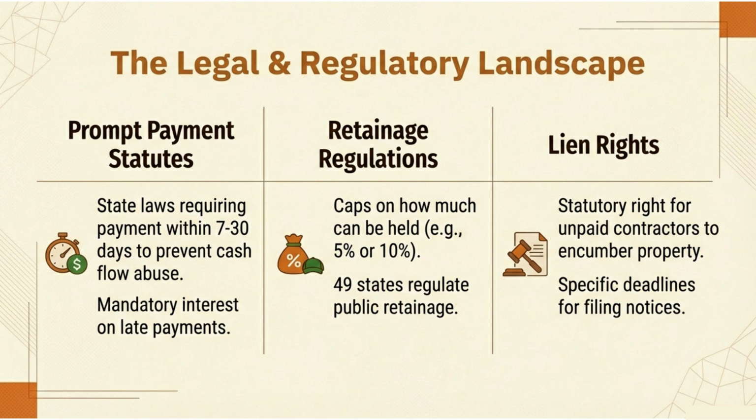Retainage regulations, middle column. Caps on how much can be held. For example, 5% or 10% max. Some states say, you can't hold more than 10% hostage. And here's a fun fact. 49 states regulate public retainage. 49. That means almost everyone agrees retainage needs limits.